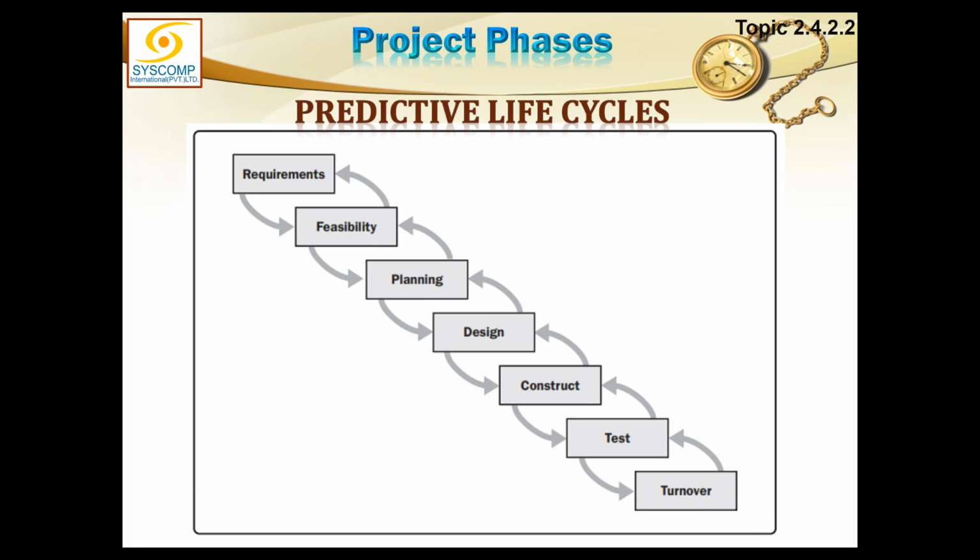In IT, we have got other kinds of cycles also. We have got a V process model. V process model is in the shape of a V. Just like, you have these steps, you have requirements, you have feasibility, you have planning. So you keep checking everything at that level and fixing it there. Testing is done on every level. And once all the levels have been done, then you do the integration testing.